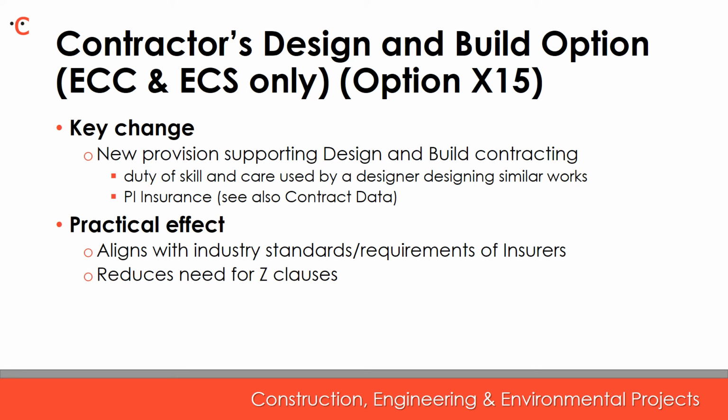After a quick run through of the key features, I will now look at the new secondary options introduced by NEC4. As I'm sure you all know, the secondary options have to be specifically selected and referred to in the contract data. I'll deal first with design and build option. In the NEC, there is no design and build form, so parties use the works information to allocate design responsibility to the contractor. NEC3 does not expressly deal with the standard of care in relation to design, meaning under English law the contractor is subject to an absolute fitness for purpose obligation unless option X15 is selected.